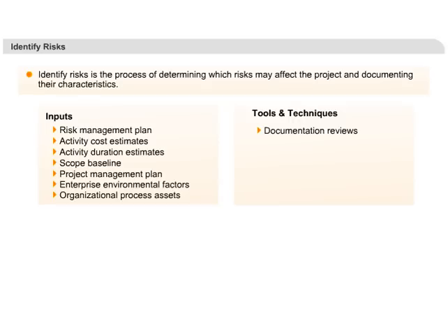One of them is documentation review, and this is a must-do technique for risk identification. This is a structured way to go through the different project documents, like the project management plan, project scope statement, and so on, to look for possible risks. If there are any assumptions listed in these documents, that can be a potential risk.